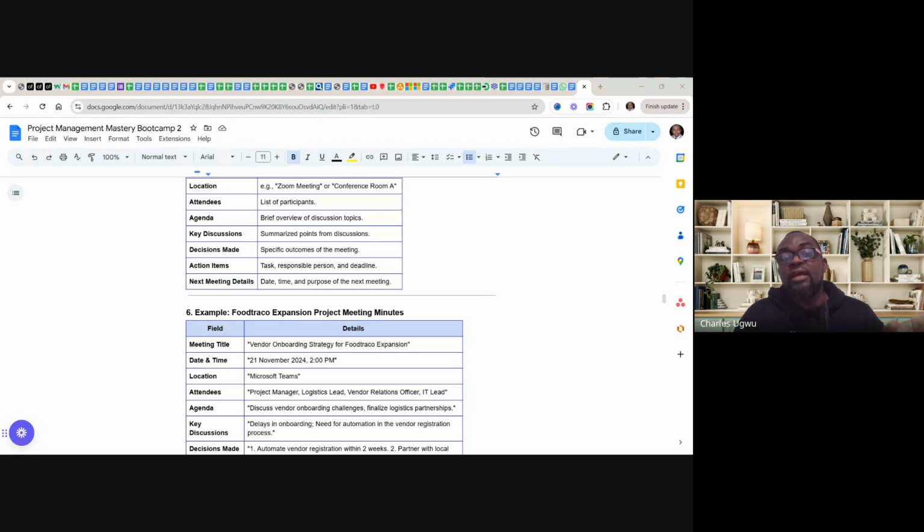If you are using an agile environment, you don't even need to ask how many times, because you know how many specified events there are. All the events in agile project management are highly specified. You know all the events. We have the daily stand-up, the sprint review, the sprint retrospective. These are various status meetings you must abide by. Or if you can't abide by them, then you are not using an agile environment.